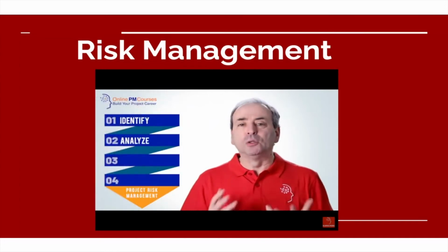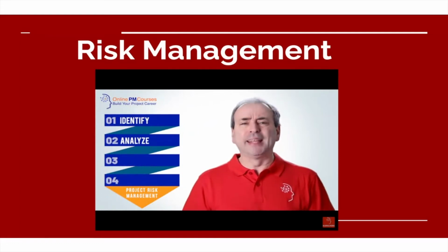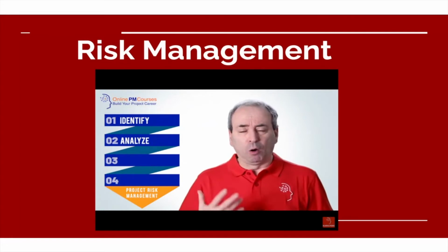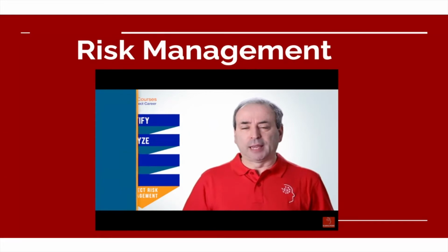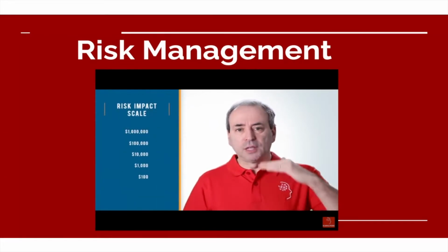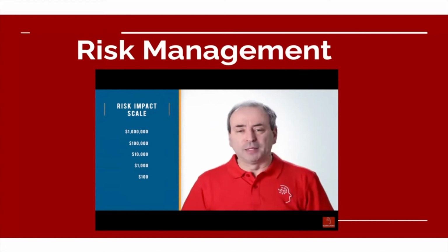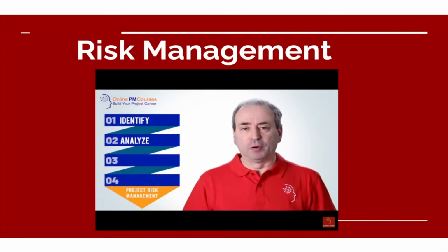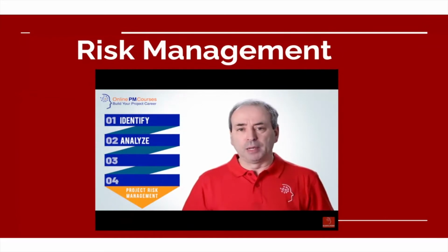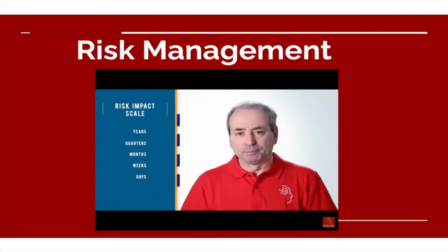For the impact, you can use a more sophisticated scale if you choose. The first thing to think about is, what do you really care about? Do you care about the impact of risks on your budget? Because if that's the case, then you may have a scale of hundreds of dollars, thousands of dollars, tens of thousands of dollars, hundreds of thousands of dollars, and even millions of dollars. Or you may care about the schedule effect of a risk. What will it do to the delivery date? In which case your impact scale might be days, weeks, months, quarters, or years.